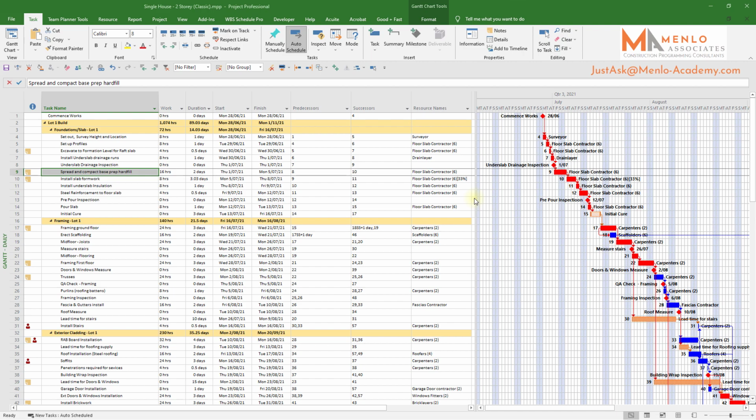However, that said, as we're starting off, technically we could start all 3 houses at exactly the same time, but let's be a little realistic in terms of we need to make some sort of chain to start with. So if we assume we've got 1 surveyor, so the surveyor sets out the first house. As you can see in here now, I've got a day's work lined up for the surveyor to set out for the first house. If we then say that once he's done this house, he moves on to the next house and spends a day there, and then moves on to the 3rd house and spends a day there, that becomes our driver for the way the work will be processed.